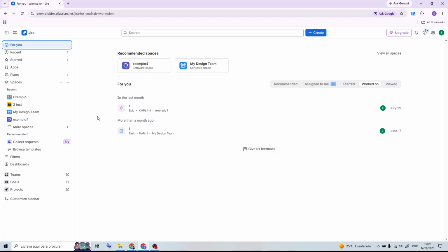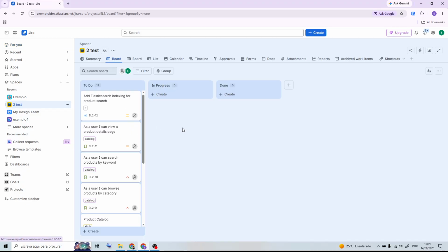In this video, I'll show you how to add a custom workflow status in Jira. First, log into Jira and open the project you want to manage. Next, go to Project Settings and select Workflows. Now open the workflow you want to edit and choose Edit.